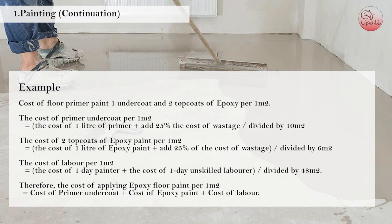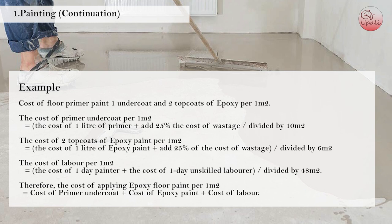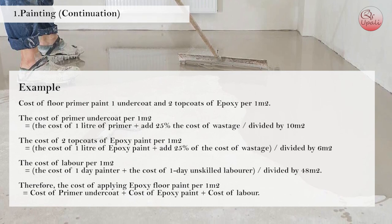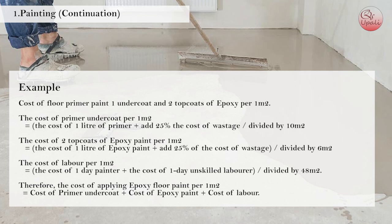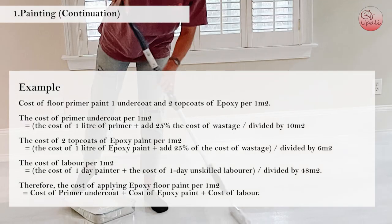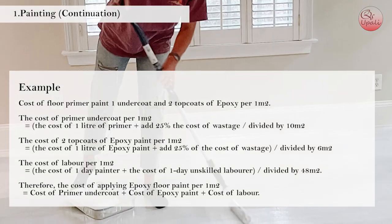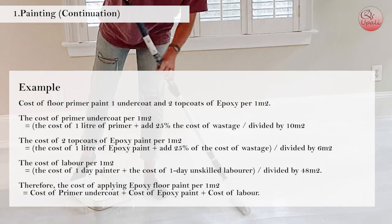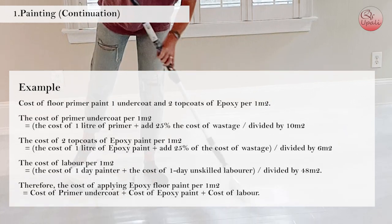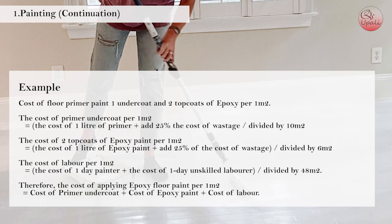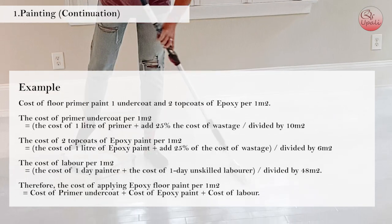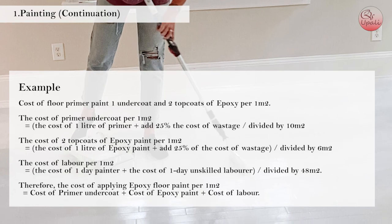The cost of labor per 1 m² equals the cost of 1 day painter plus the cost of 1 day unskilled laborer, divided by 48 m². Therefore, the cost of applying epoxy paint per 1 m² equals the cost of primer undercoat plus the cost of epoxy paint plus the cost of labor.